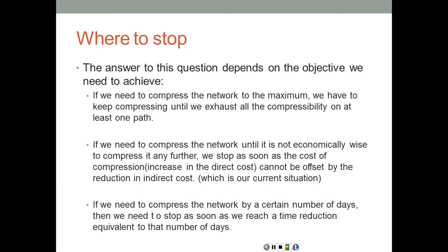If we need to compress the network by a certain number of days, let's say all we wanted to do is compress the network by 3 days, we have already achieved that, so here we can stop. So it depends on how the question is being asked.